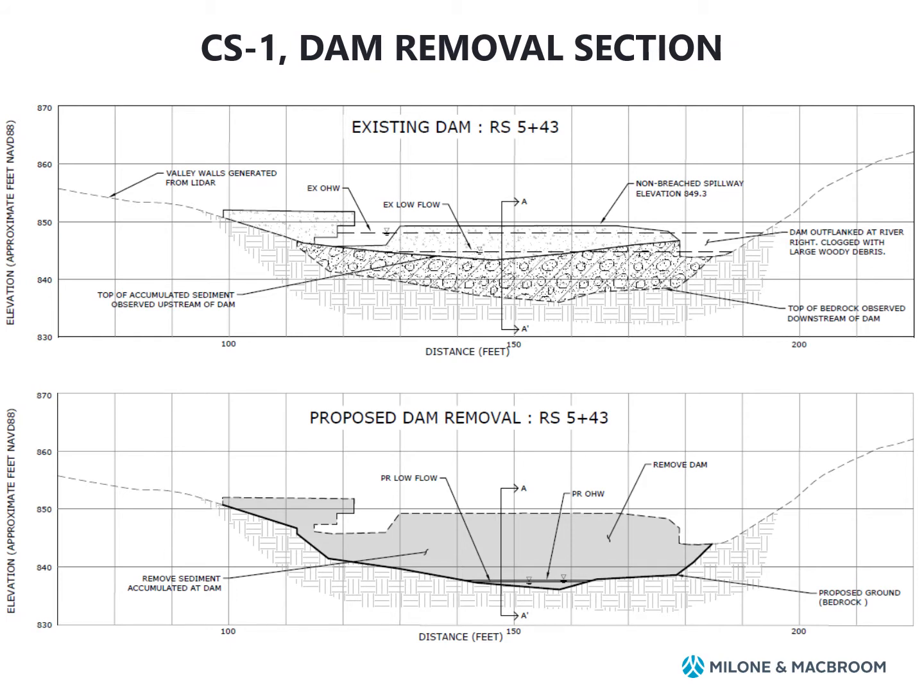The removal of the dam would be done incrementally to bring the dam down, along with the sediment, in stages. That's going to need to be carefully controlled to make sure that we don't have a huge sediment release during the construction process.